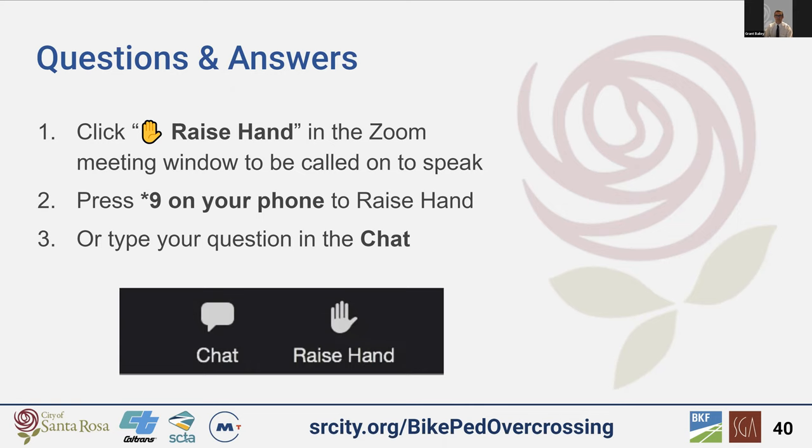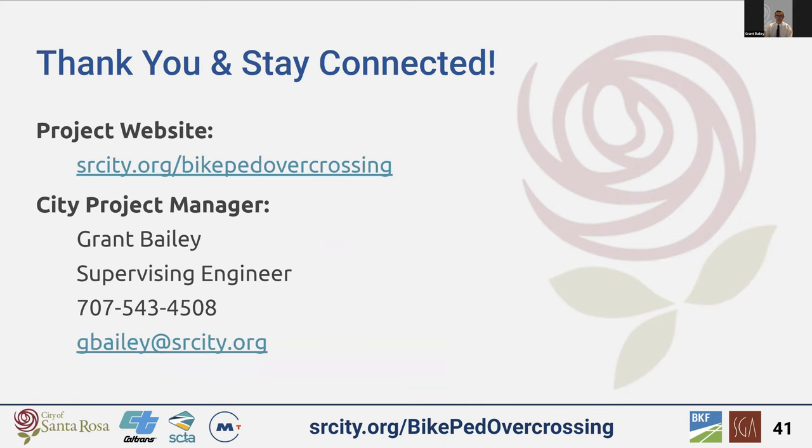Next slide, please. We appreciate your attendance and hearing your input on the Santa Rosa Highway 101 bicycle and pedestrian overcrossing project. As I mentioned earlier in the meeting, the next steps include moving into the detailed design of this project, which we expect to complete in July of 2023, and construction to begin in October of 2023 as well. With the project construction timeline expected to take about 2 years, the city anticipates completion of the overcrossing in the fall of 2025, when it will be open to the public for use.